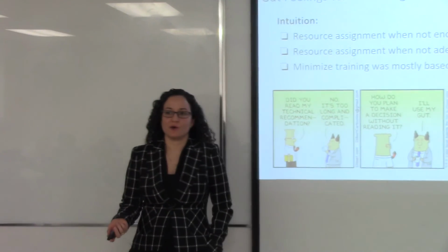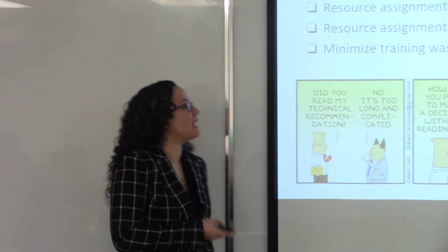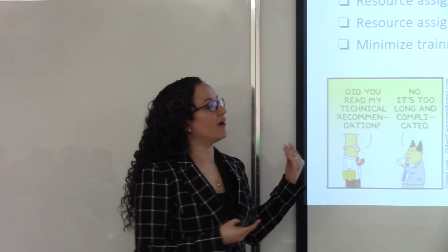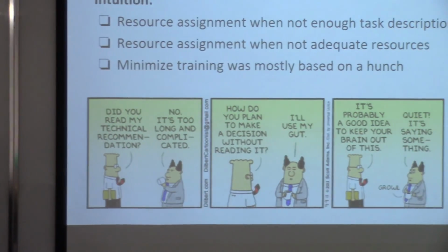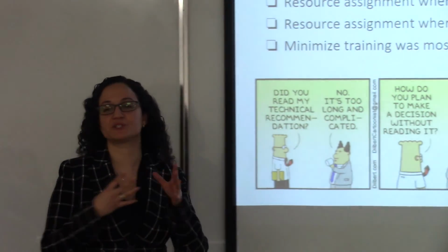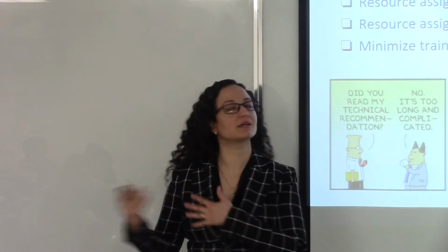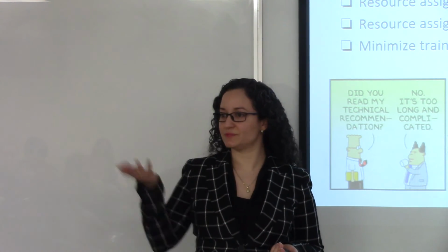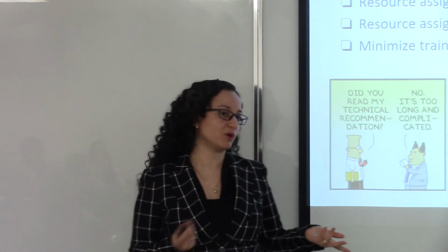Basically, our decision approach was based on which information was available, and if that information was accurate and detailed enough to make a decision about it. We used our gut feelings for decisions like assigning a task that was not clear enough and the description was not sufficient, or assigning a task when we don't have a perfect resource match for that task. For example, the inspection task in several rounds, we discussed, should we assign a project manager or should we assign an expert resource, so a plumber or electrician. In our case, we assigned the project manager and the resource was pretty good.